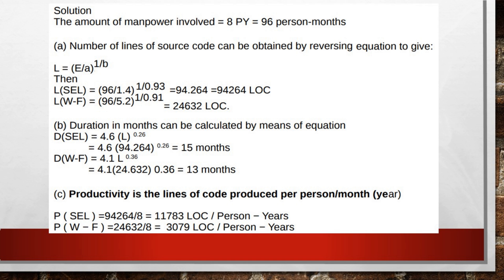Once we find the number of lines of code L, we can calculate the duration for both SEL and WF methods. Substituting the values of A, B, and L into the duration formula: the duration is 15 months as per the SEL method, and 13 months when using the Watson-Felix formula.